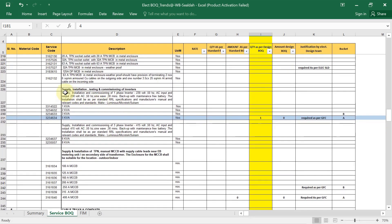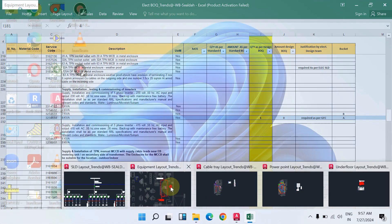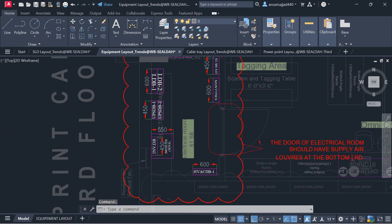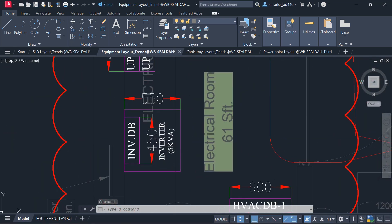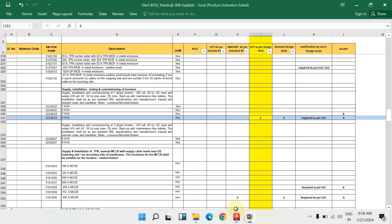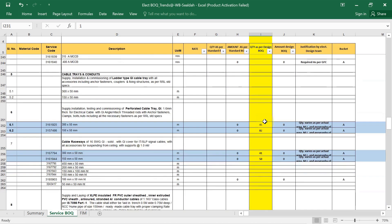Next, supply installation testing and commissioning of the inverter. In our project, from the equipment layout, the inverter is placed in the electrical room with a capacity of 5 kilovolt ampere. In the Excel BOQ sheet, different sizes are listed, but our inverter is 5 kVA — I have written quantity 1.